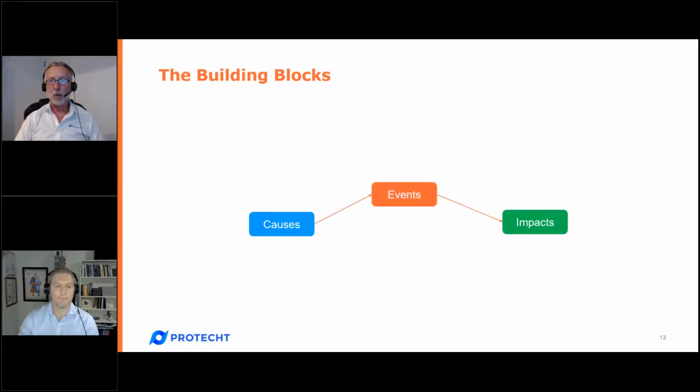So we typically have our causes, events, and impacts. Then after that, we add our controls onto the risk, and we have our 4 main components. Wait a sec, I said 5. Well, we also call out failure of critical processes, which is actually an event, but it is a late event. It's an event that happens just before impact on objectives. And we think due to the linkage between risk events and impacts that going through and recognizing failed processes is